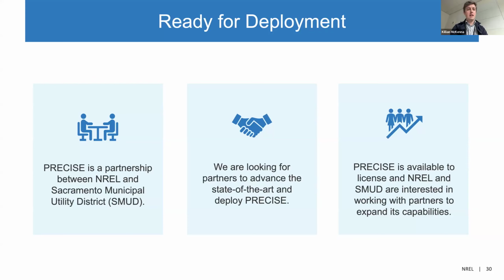Yeah, I'll take this first and then I'll hand this over to Sheikh. There is an element of truth in that. If you are using screens and everything is passing the screens, then it is quick. However, if things are failing screens and you have to move to a supplemental study, that's where things are really going to slow down.